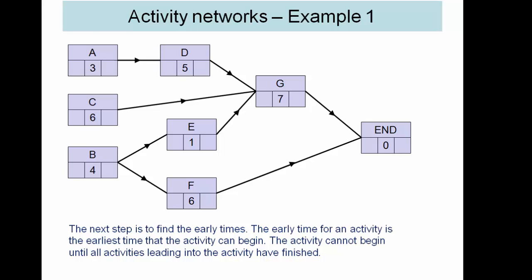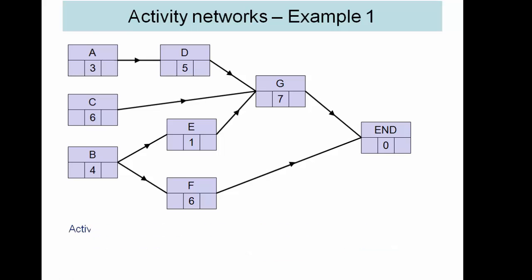The first part of this process is to put the earliest time that each activity can start. So obviously A, B and C can all start at time zero. D requires A to complete so D can't start until A is completed so the earliest that will be is three.